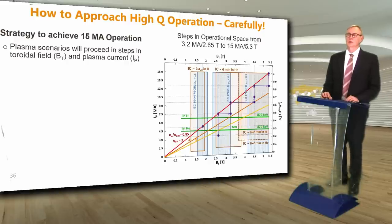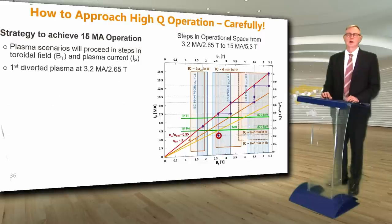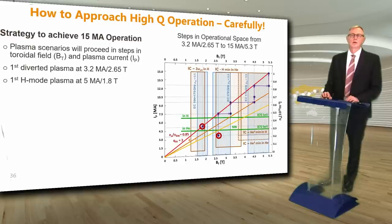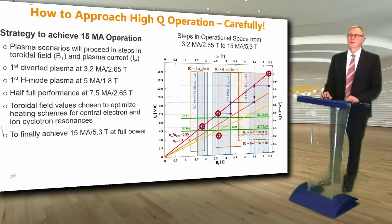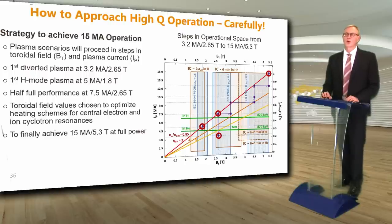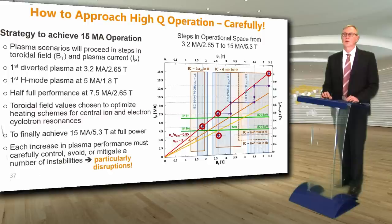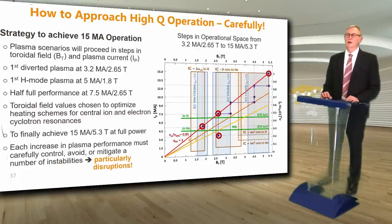How will we approach high-Q operation? Carefully. The ITER research plan describes a careful strategy to achieve high plasma performance operation up to a plasma current of 15 megamps. Plasma scenarios will proceed in steps in toroidal field and plasma current with key milestones at the first diverter plasma at 3.2 megamps and 2.65 tesla, the first H-mode plasma at 5 megamps and 1.8 tesla, and half full performance at 7.5 megamps and 2.65 tesla. Each increase in plasma performance must carefully control, avoid, or mitigate a number of plasma instabilities, particularly disruptions, which are the worst of the instabilities.